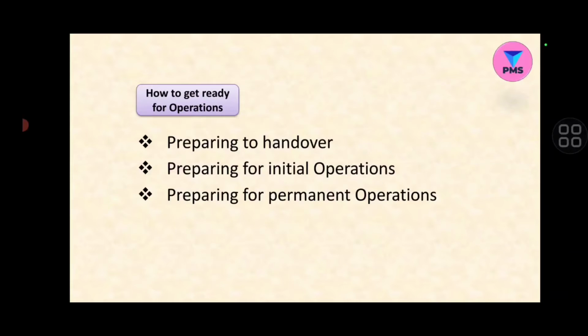Next comes how to get ready for operations. This is basically for construction projects, because we are preparing to hand over, preparing for the initial operations, and then preparing for the permanent operations with the customer, and what support you are going to give to the customer. So these all will be covered under the project management plan, under how to get ready for operations.